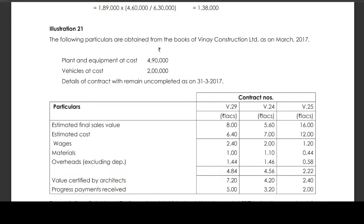For contract V24: Estimated final sales value is Rs 5,60,000. Estimated cost is Rs 7,00,000 — comprising wages Rs 2,00,000, materials Rs 1,10,000, overheads excluding depreciation Rs 1,46,000, totalling Rs 4,56,000. Value certified by the architect is Rs 4,20,000. Progress payments received is Rs 3,20,000.